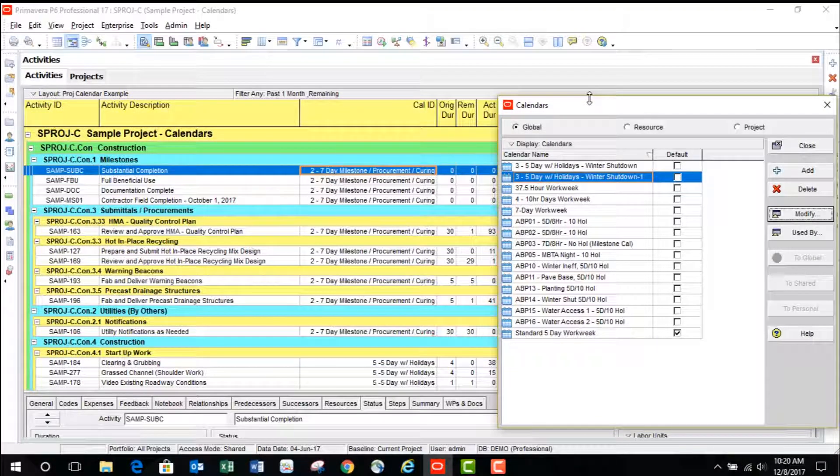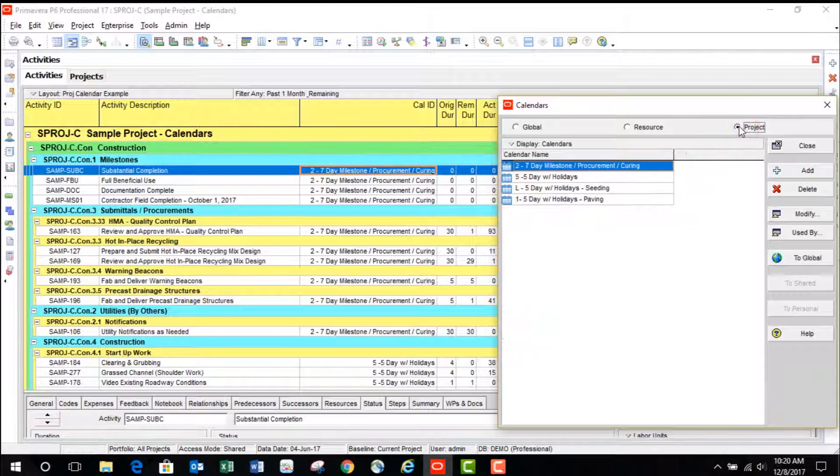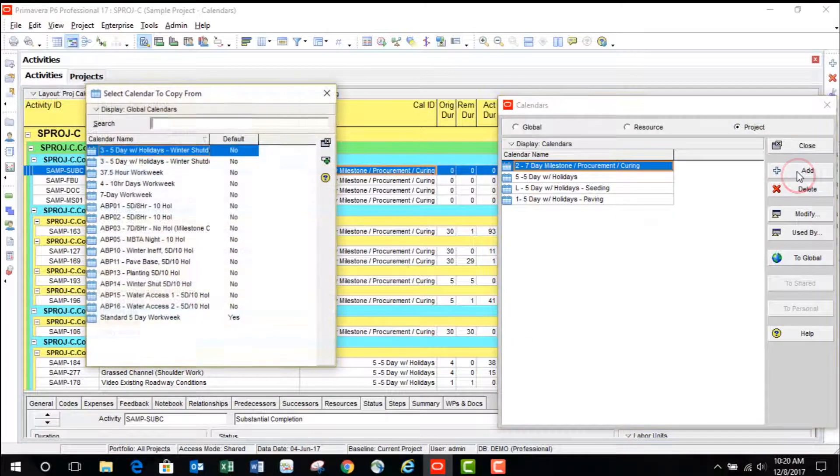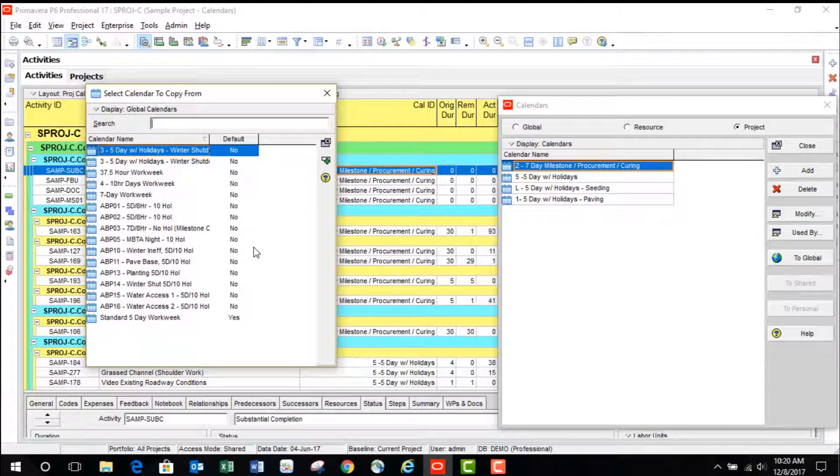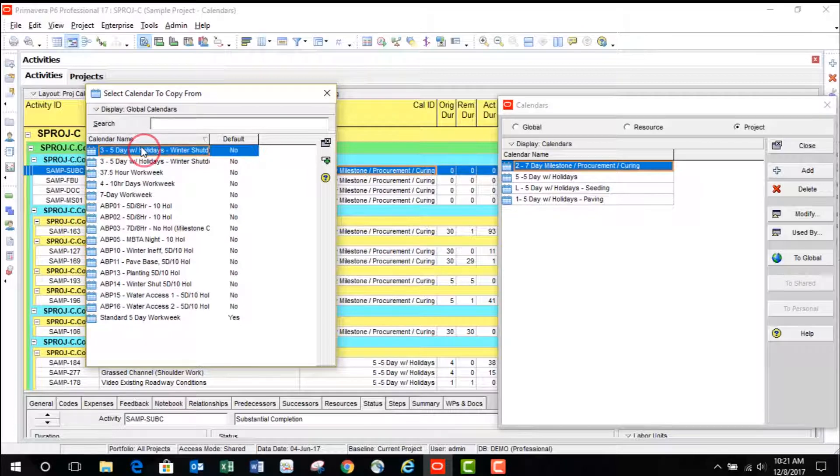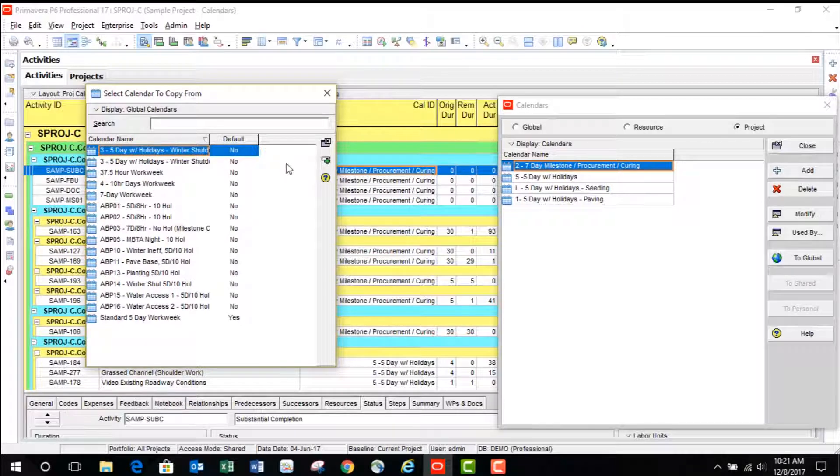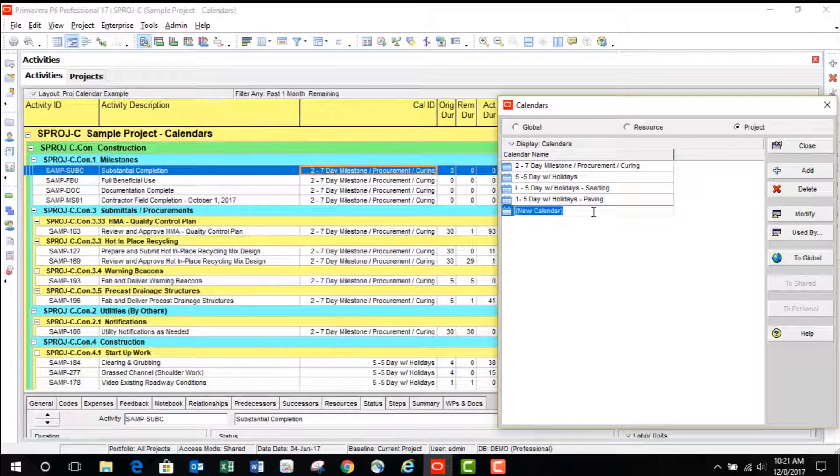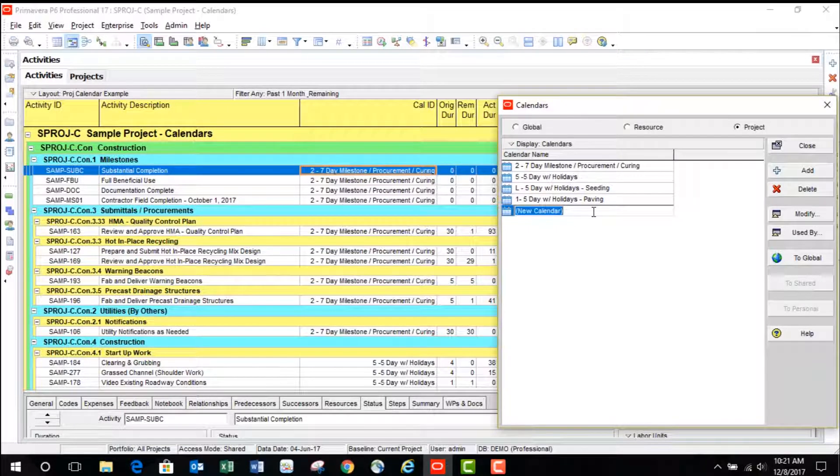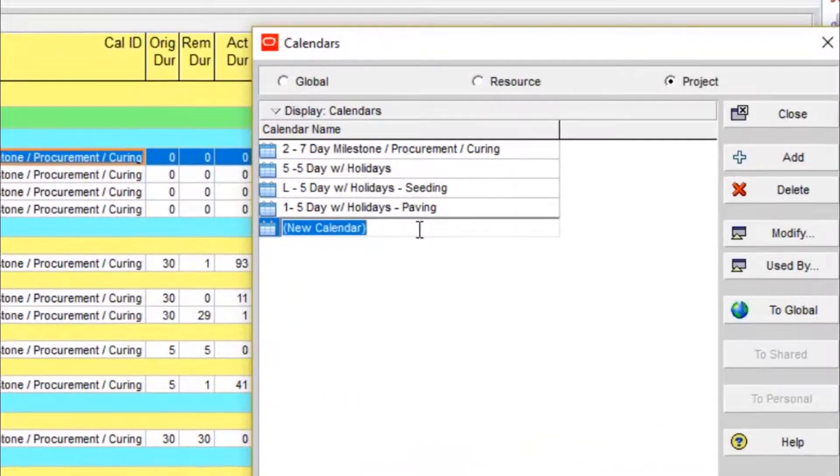To define a project calendar, go to Calendars on the Enterprise menu, be sure Project is selected, and hit Add. This will bring up a list of all the global calendars in your database to choose one as a starting point. Once a global is selected, you will then name your project calendar. This can always be adjusted later, but you may find it useful to add some identifier, such as a project number, to quickly note what project this calendar is set up for.